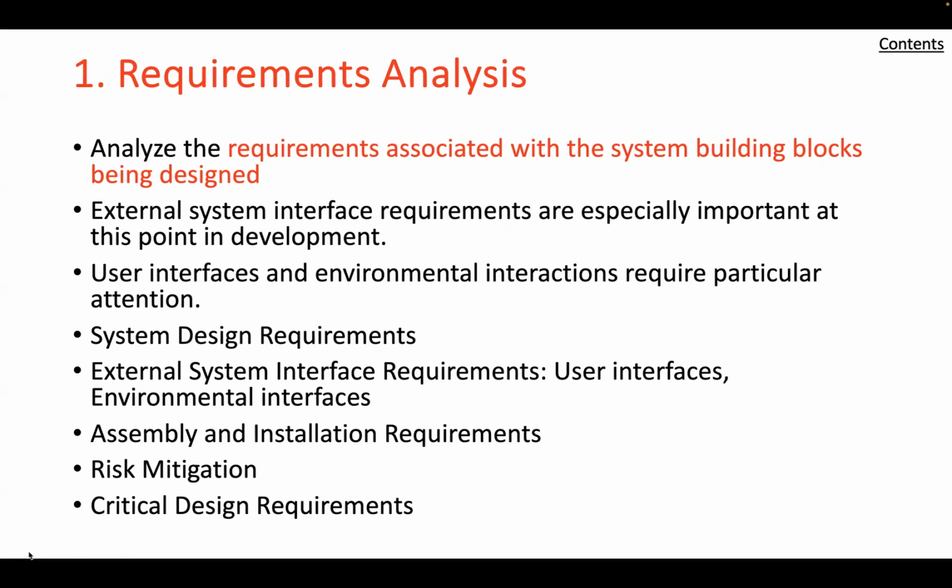Components that were identified as involving some risk, but not to the extent of requiring special development effort, and previously proven components that will be required to perform at higher levels or in a more stressful environment must be particularly scrutinized at this stage. The results of these analyses should be inputs to the planning of risk management during the engineering design.